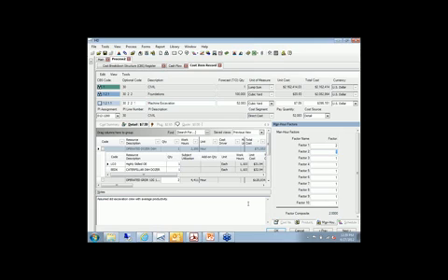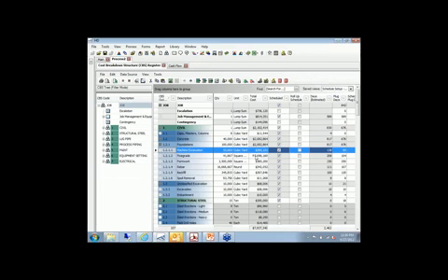assumed that our productivity is going to be essentially, we're going to take twice as many man hours as we had expected. Right, well, obviously that drives our cost up, that drives the duration up. It's going to take longer to do that work. Okay, so back on the hard dollar side, by applying those factors, those durations have now increased. Okay, so you can see those estimated days right there are now basically twice what they were before. You can see right next door, they used to be 69 and 104 days. Now, because of those factors, they're twice as much.